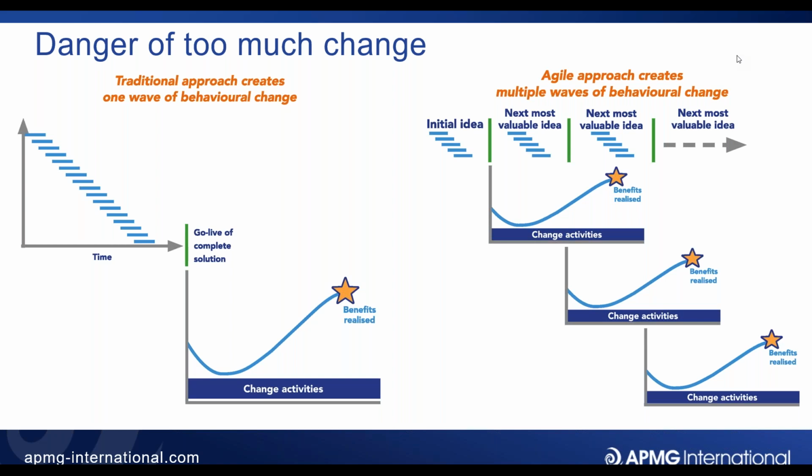then tackle the impact. Does that impact require us to provide some coaching or training? Does that impact require us to provide maybe a test environment that people can practice in? Do we need to do more explanations of what's going on? So I want to not just identify the impact, but also address it. And I have found that the most important thing when there are layers and layers through the organization is that that impact is driven down through those layers by representatives at each of those layers. So that's my take on it.